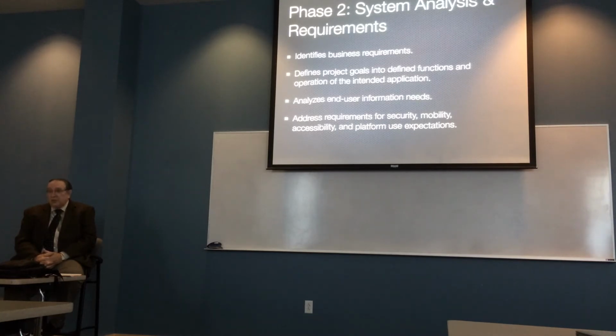We all use different methods, the user story, the use case, all kinds of things to try to figure out what exactly the customer wants. They're all valid tools. We're not telling you not to use them or to use them, but make sure you get these issues out. Because if you're auditing a project, one of the first things you're going to do is go back and say, well, what were the identified business requirements? So I would suggest that's an artifact you better write down. That one matters.